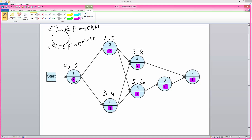For activity six, we pick six from activity five, which is the earliest finish for activity five. That becomes the earliest start time for activity six, and six plus one makes the earliest finish time for activity six seven weeks. Going forward, between eight and seven we pick eight, plus one activity time, we get nine. So the earliest time that this project can be finished is in week nine.